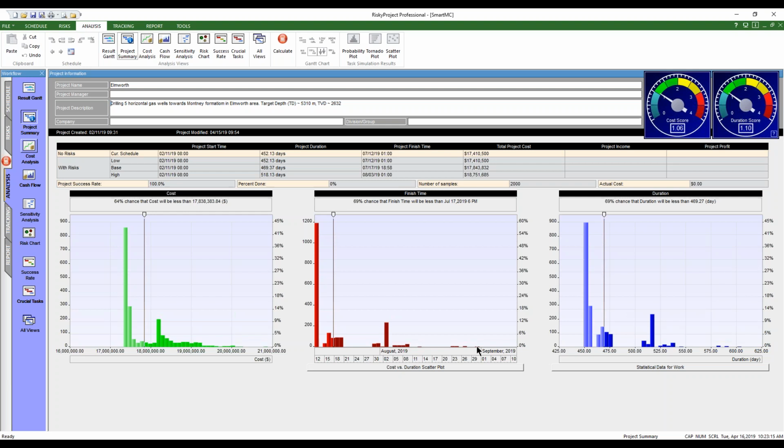But there is this natural variance that happens in any project, any activity that we do, not just in projects, anything you do in the world. There's some natural inherent variance. It's called aleatory risk. It's the difference between driving to the grocery store and doing the shopping, versus a risk event, where you get a flat tire or you're in an accident.